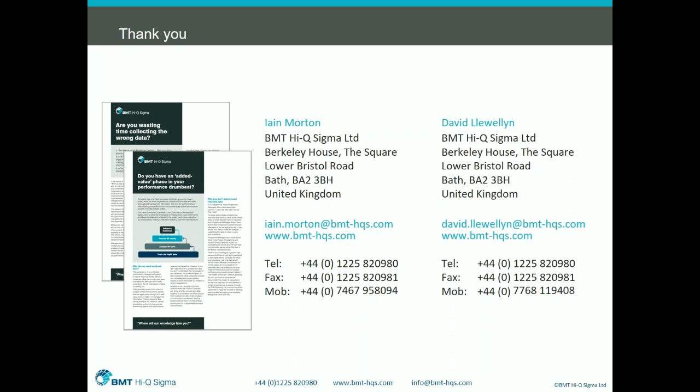So the one we created was quite simply in Excel, and it was pulling the data from the Microsoft Project schedule, which was the tool set that they were using in DNS. Ultimately, we created a number of formulas that would tell us, from a schedule performance indicator perspective, how the project is performing. But then they also had their cost accounting tool set, and we physically took the data from there and pulled it into Excel. As we said, it was an interim measure, but it did allow the projects to measure how they were performing. So very simply, it was created in Excel. The data came from Microsoft Project and also from their cost accounting tool set.